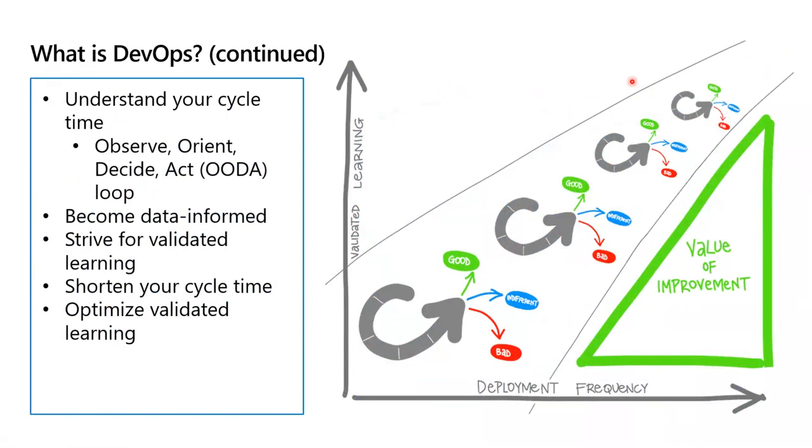So instead of sitting down and creating large volumes of documents and requirements, what we are going to do is separate everything into small chunks. All the requirements are going to be split into small pieces, and we are going to be working on each piece every period. Normally, this period is referred to as a sprint. And each sprint is going to last about 2 to 3 weeks. And at the end of this sprint, we are going to deliver the result of the sprint to our customer.